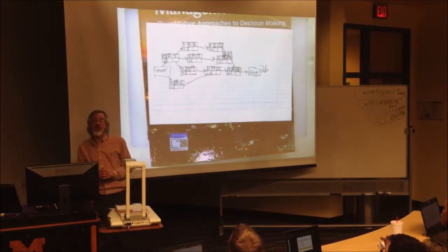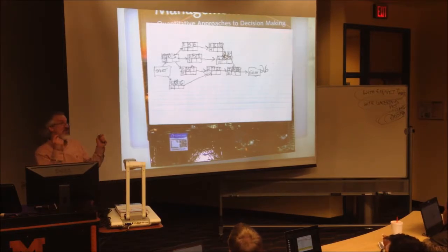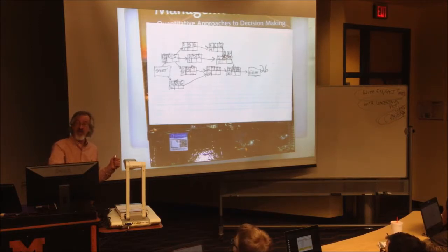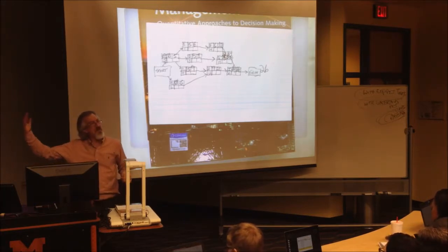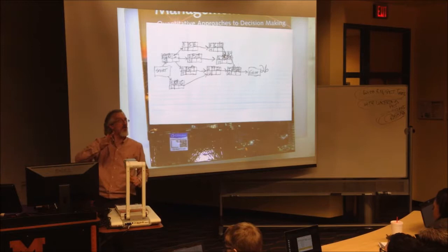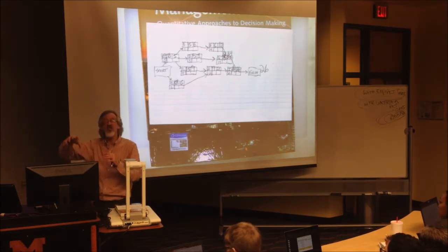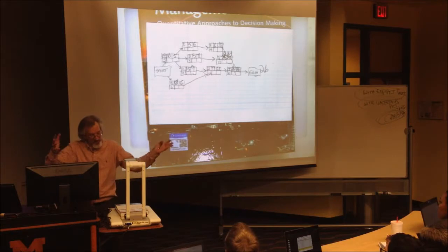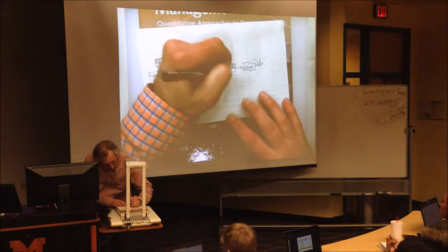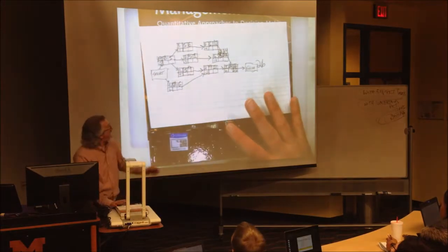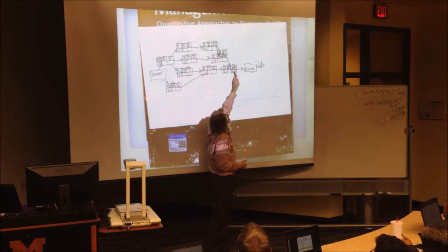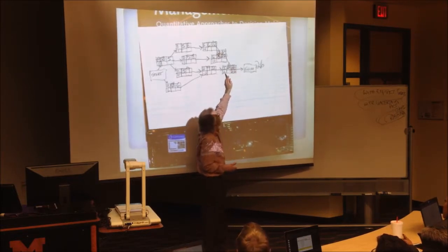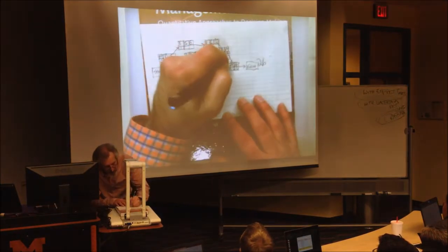Here we go now. We're doing a backwards pass, and you'll see the reason why. The real reason we're doing a backwards pass is to find the critical path, which has no slack, and to find the activities that do have slack. They're not as critical. We're starting at the end, and the activity coming from the finish backwards has to be at the project expected time. There's only one activity, which is I. In the bottom right corner, I, going forward, should be finished about 26. Going backwards is also 26. Subtract 2. What do we get? 24.